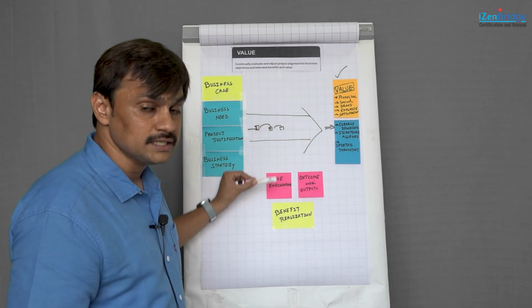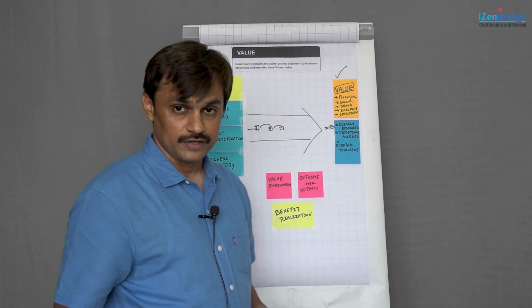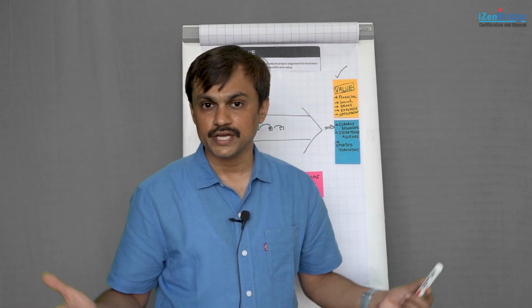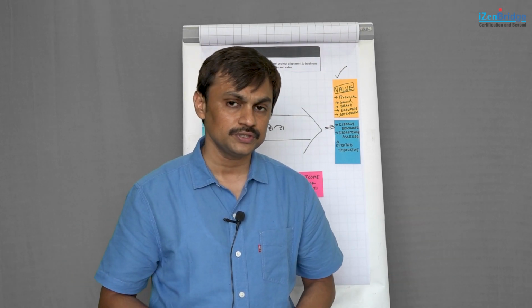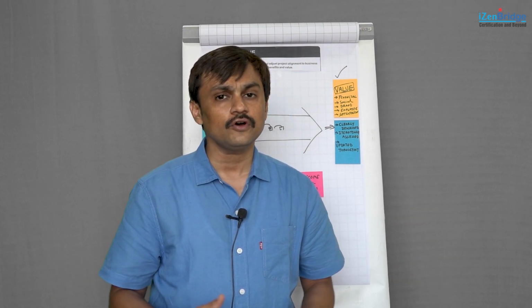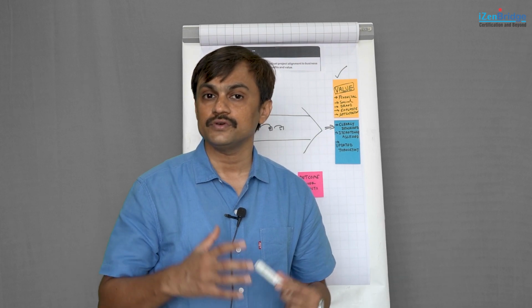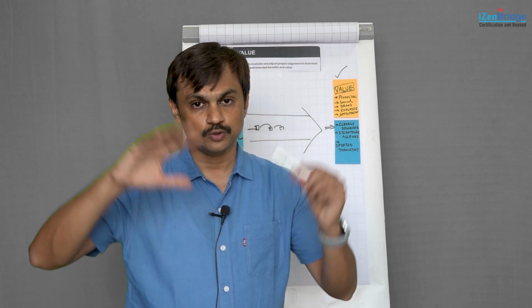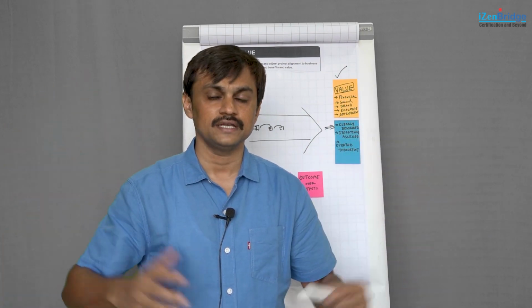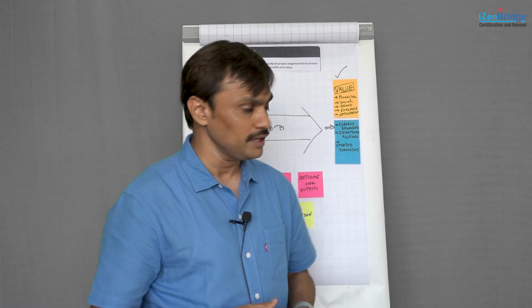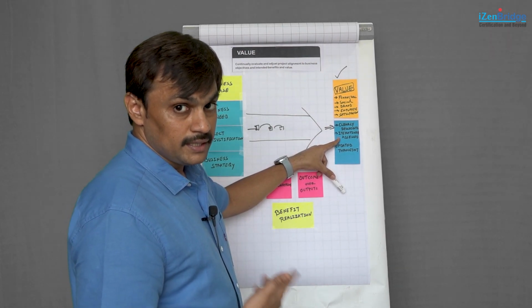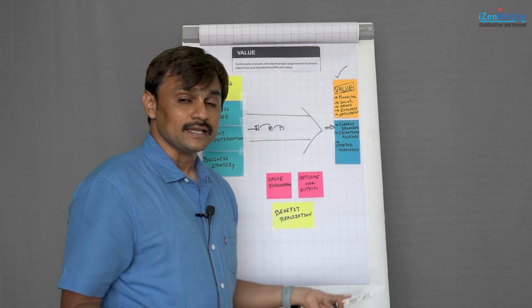So, as a project leader, I need to organize such kind of interaction with my key stakeholders. In the adaptive way of working, reviews and demos are a good mechanism to do that. In a predictive way of working, milestone reviews and frequent interactions about how things are going related to the outcome space, related to the business space, is also a good idea. So, milestone review and iteration review. So, we need to evaluate them iteratively, and then we need to update them.